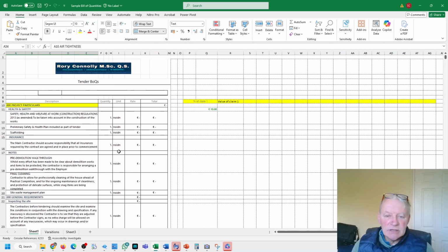So it breaks down into the sequence of activities on a project. Then it takes all the information from drawings and specifications and puts it into those sections. Then it quantifies them and allows the builders to use it for multiple reasons.